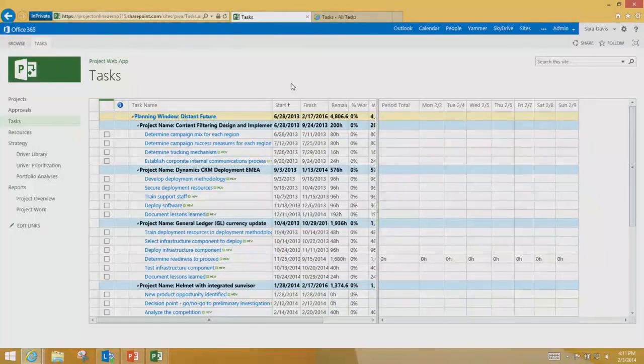So the net takeaway from that is in Project 2013, using Project Server, you have two types of projects. SharePoint Task List, collaborative, great. The only place you get scheduling engines and such is in the project client. Enterprise project works the exact same as all the projects you're used to in Project 2010 and earlier. So you don't actually need the project client to edit that one and use the scheduling engine. You just probably want it because of all those features I showed you earlier in the demos.